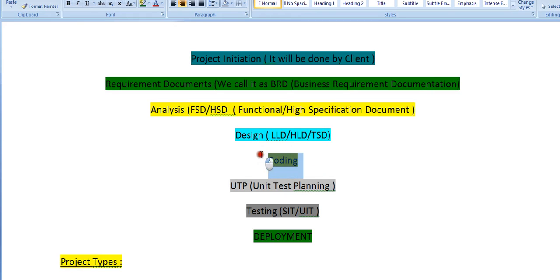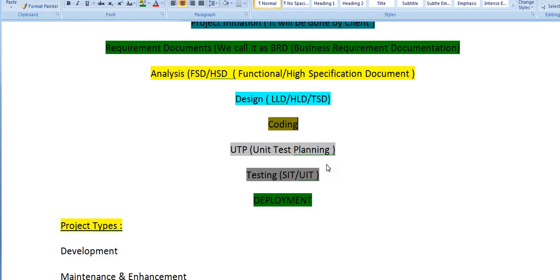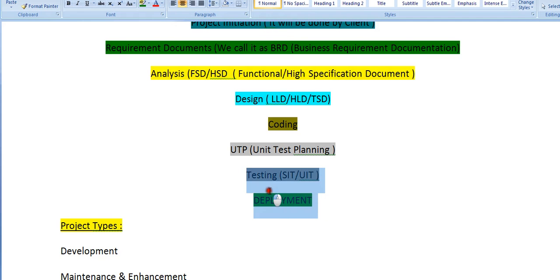Once the design and Technical Specification Document has been prepared, it will be assigned to the respective project manager and project leads, who assign it to team members. The team members start coding. Once coding is completed, they plan for unit testing, and once that is completed it goes to testing — either manual or automation, including system integration testing and unit integration testing.